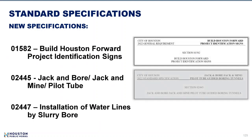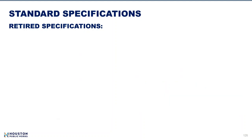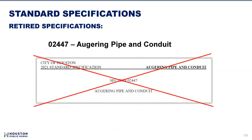Specification 1582, Build Houston Forward Project Identification Signs, is provided with a new standard detail — highlights will be presented later. Specifications 2445 and 2447 are provided due to the latest changes in boring methods industry. Marcus Mengesha will present the highlights for these specifications after my presentation. Regarding retired specifications: new requirements for boring methods led to two new specs, and one of these replaced the existing outdated specification 2447, previously called Auguring Pipe and Conduit.